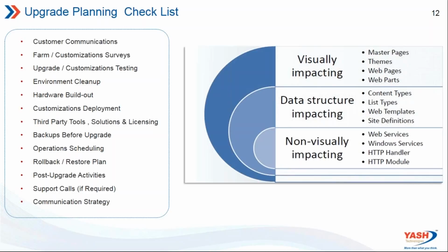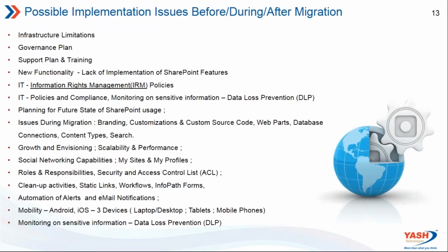And what are the backup options, what are the recovery options, what are the rollback options we may have, what are the contingency factors, and do we want to have a farm level backup or a database level backup or an item level backup or an incremental level backup. So we can plan it out, and scheduling of operations so that it does not have a conflict with the production patching aspects of it. This is in a nutshell about the preliminary checklist.